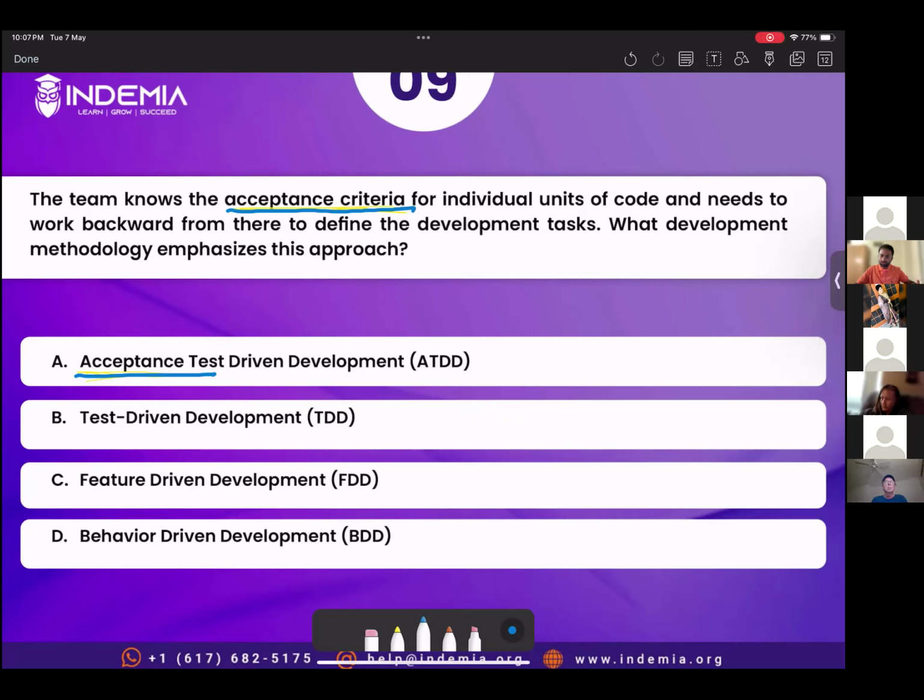You develop it, and you move to the next feature. So you develop a model of your product in the start. That is a combination of various features. You prioritize features, you plan by feature, you develop by feature, right? You review it and you move to the next. So feature after feature, that is called feature-driven development.